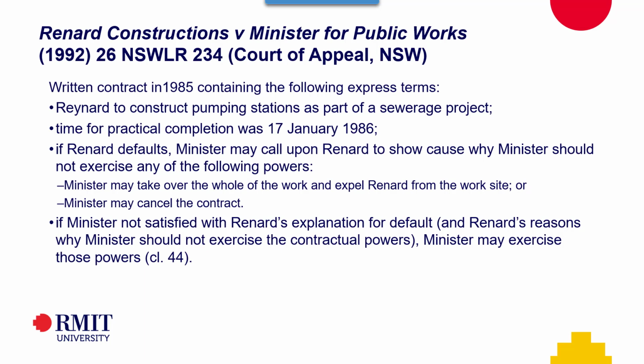Okay, Renard. Look, I say Renard, and so then I wrote Renard. Sorry about that. It's actually Renard. Renard Construction is the Minister for Public Works. So this is an oldie but a goodie. There was a written contract back in 1985 which included terms that are on the screen here. Renard needed to construct a pumping station as part of a sewerage project. They had to have practical completion by the 17th of January 1986.